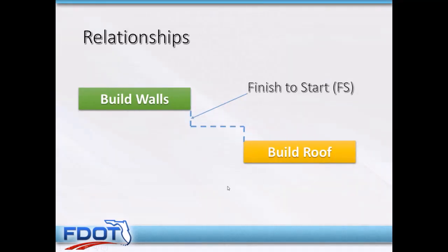The finish to start relationship with a 3-day lag. You'll probably hear about lag sometimes in CPM scheduling and scheduling reports, and that's what a lag is. Keep in mind that the total process from here to here now has been increased by 3 days, so you have to account for that.